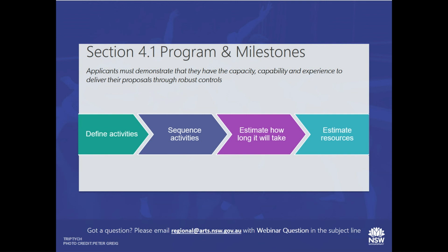So in this section, we're going to outline the key events and decision points in your project. The milestone sequencing and estimated duration are crucial to demonstrating that you've thought through the process. So estimated cost in this section should be lining up with your budget. If you've got a milestone that is doing X, there should be a corresponding expense that can be explained in your budget. Now, in the template, there's no cost column in the budget template, but we suggest that you add one. It's quite easy.